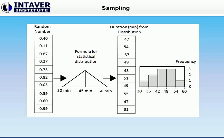Sampling will produce a sequence of values which can be taken from the probability distribution. Each distribution has a formula where the input is a random number and the output is the value — in our case, the duration of the task. The results are shown on a frequency histogram. The histogram is discrete, yet still resembles the shape of the original distribution, which in our case is triangular. The more iterations we have, the more it resembles the input distribution.